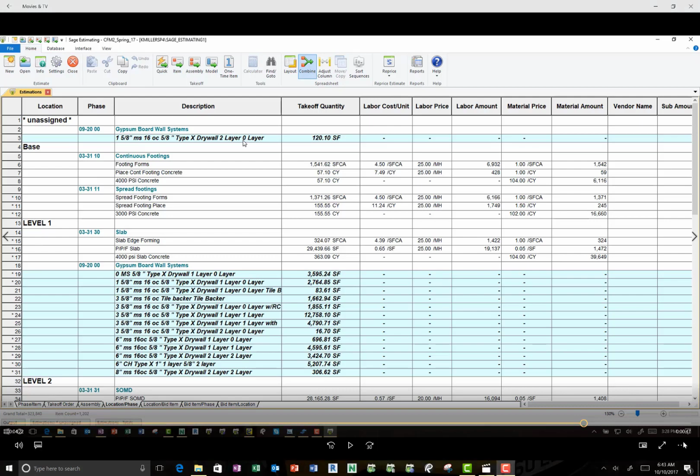Now, as I get the next iterations of the estimate, I can go and just have the computer take it off automatically for me. Additionally, as I get future projects I'm working with the same design team, the computer already knows how the designer arranges their families and how it relates to my Sage estimate. And so it can already take off what it's been taught, leaving just the things I haven't taught it yet. So it should greatly reduce the amount of time that I spent doing takeoff.